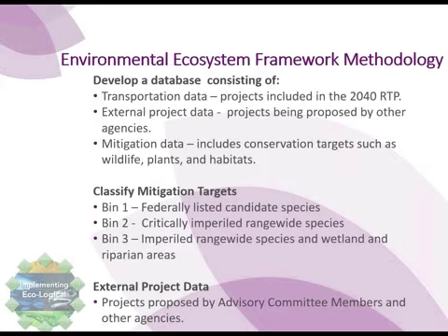Next, transportation impact buffers were created around each transportation project depending on the scope of the project and its surrounding environment. This was based on prior knowledge and expertise of planners who had worked on NEPA studies in the state or region before. Some mitigation requirements were identified based on regulation or statute, and some mitigation desires were identified based on impacts to highly desirable habitats or connecting links or projects that might have potential for funding from different sources, like nonprofits. Existing regulatory mitigation rules allow for out-of-type and out-of-area mitigation, so we used this as justification for creating an overall impact mitigation plan in place of identifying mitigation sites near each transportation project.